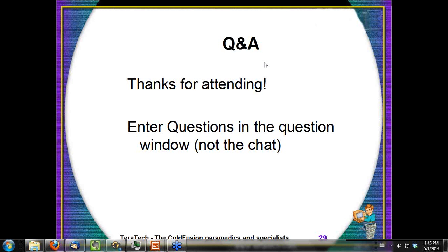So making sure that they're written clearly, definitely have some prototype or mock-up screens that you maybe put screen prints into the printed requirement, but you also have available that people can click through. And then I would include a vision statement at the front of it and some goals. So it's like an executive summary that says, here's what this project is all about, here's how we're going to know it's successful. If it's got these following goals achieved, then yeah, we're going to be happy with it. So those are things that I like to see in there.